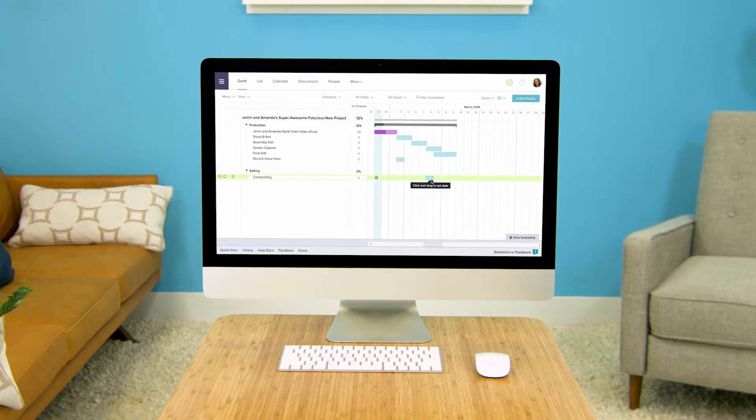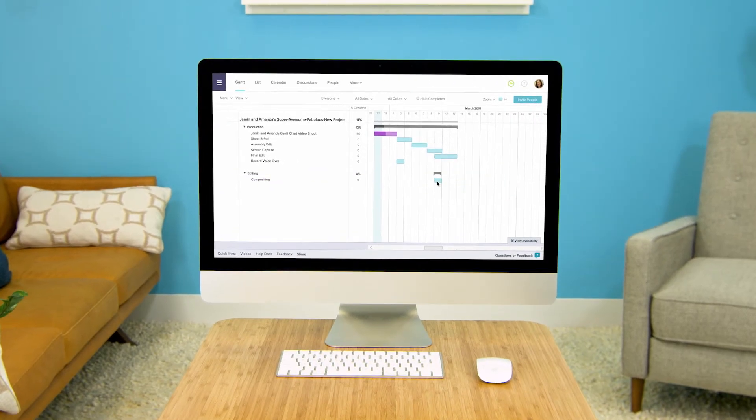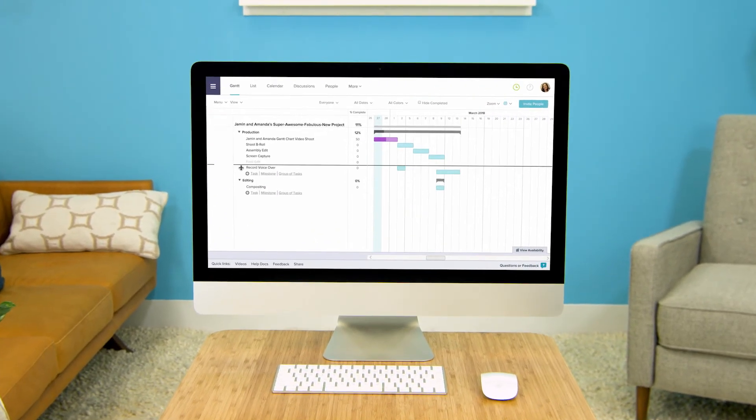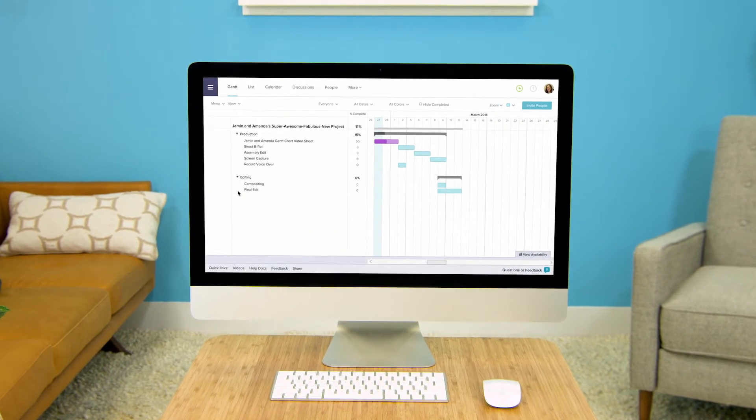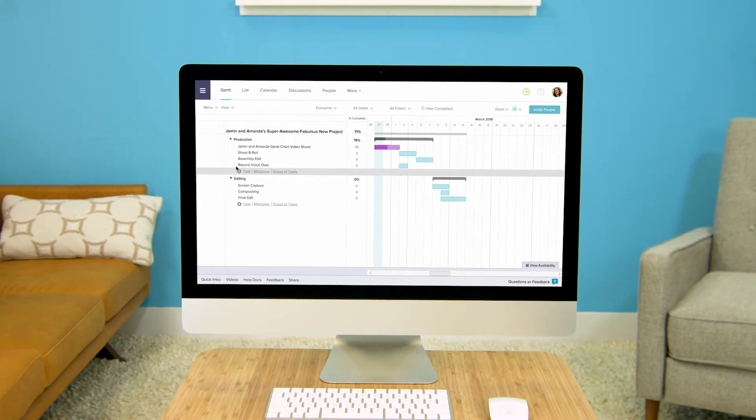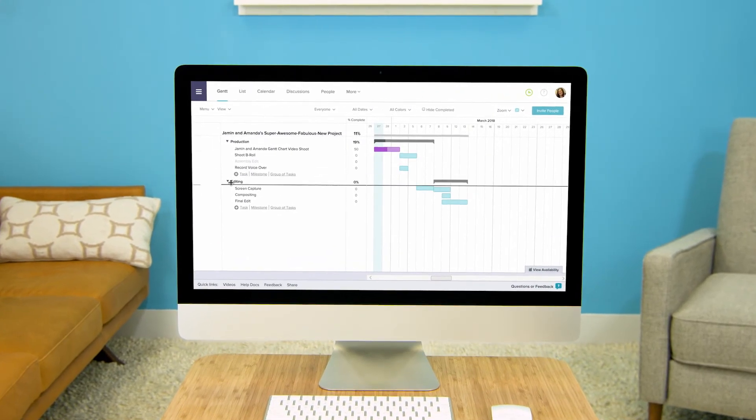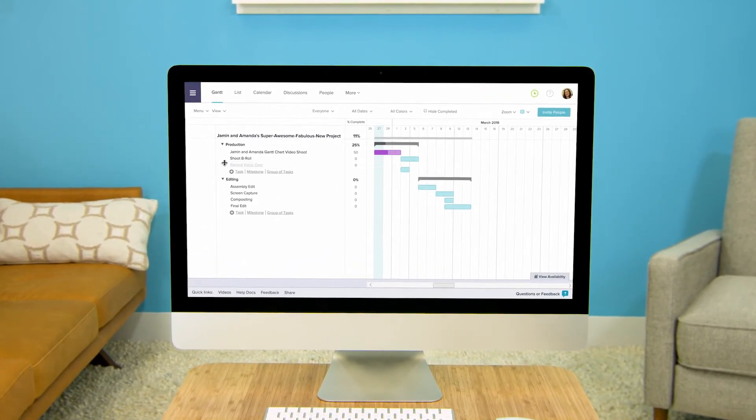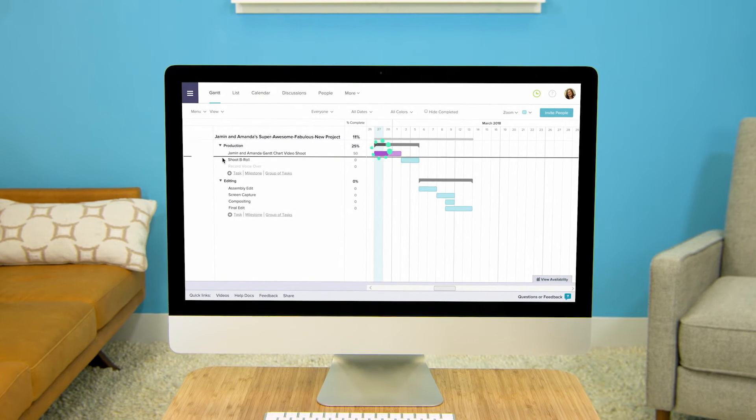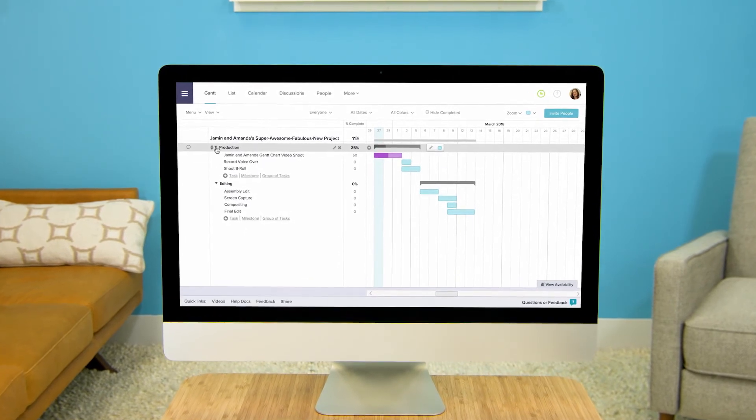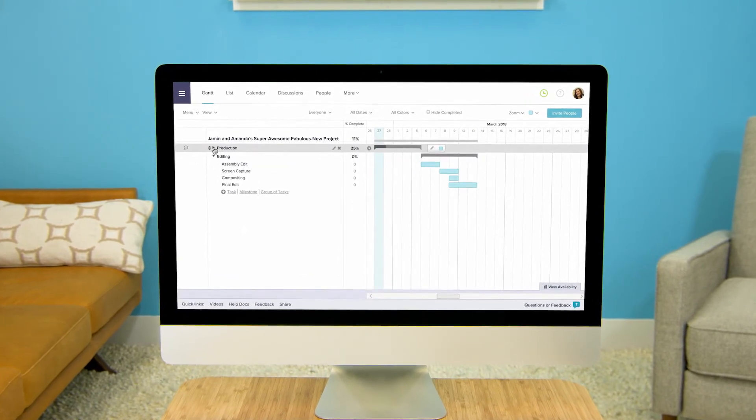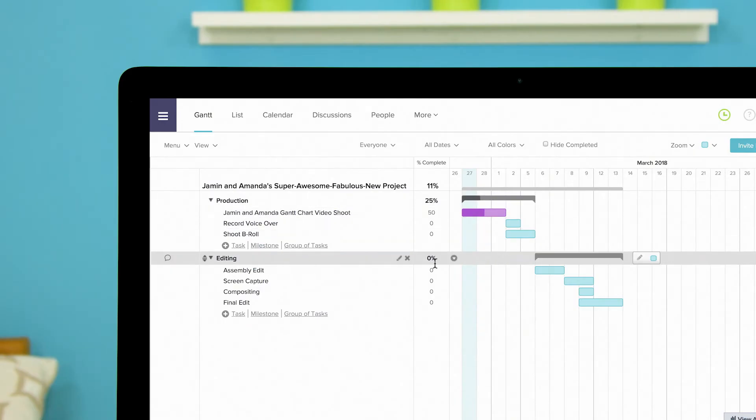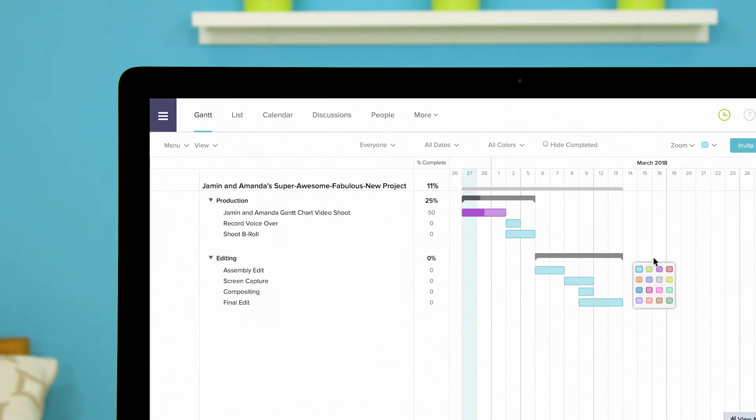You can also move tasks from one group to another by clicking and dragging the drag handle that appears to the left of the task when you mouse over it. You can also use this to reorder tasks within a group. Collapse a group by clicking the disclosure triangle to the left of the group name. The gray bar in the task group row is the progress bar for the task group. If you mouse over the bar some options appear to the right of it. Click the color icon to change the color for all the tasks within the group.